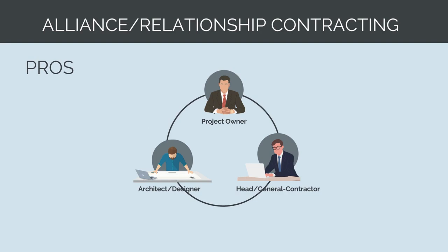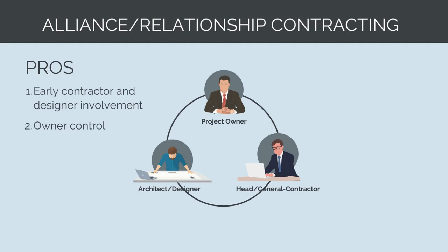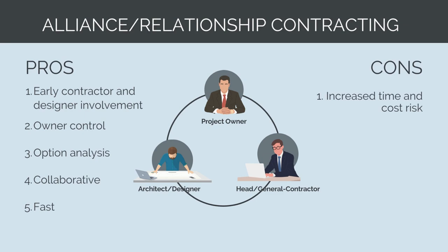The pros of an alliance model are that the contractor and design consultant are involved early, ensuring the best solution is developed. The owner retains a lot of control through delivery, and during the early feasibility and concept design stage the alliance team can explore lots of different options to save cost and time. This model is collaborative, largely avoiding disputes between the owner and contractor, and it's fast with no need to clearly scope out and run a competitive tender. Some negatives are that the owner is still exposed to cost and schedule overrun risk — though less so than under a managing contractor model — there is some uncertainty as to total project cost and duration, and the owner doesn't benefit from competitive pricing between contractors.